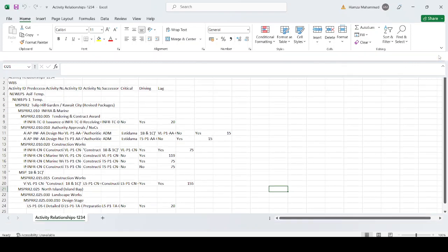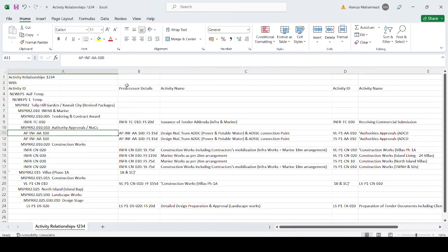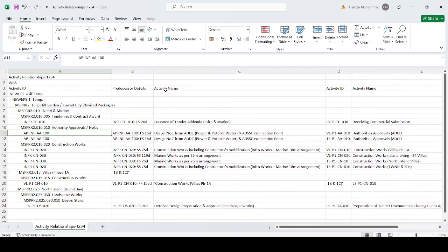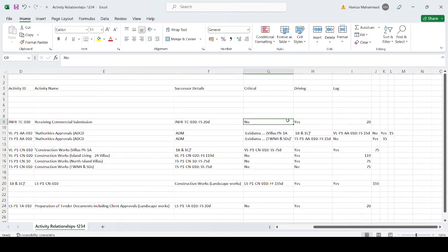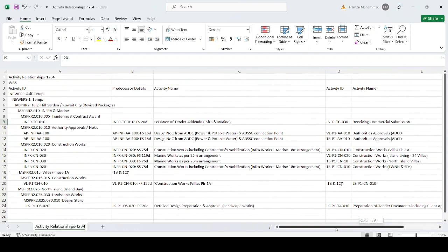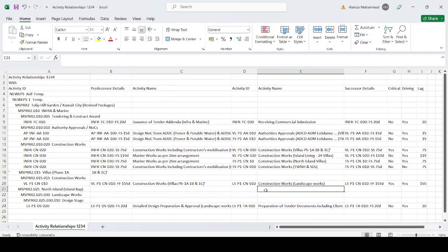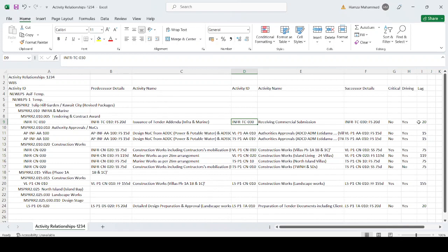The report output is now shown. You can see Predecessor Activity ID, Successor Activity ID, Activity Name, Relationship Details, then whether it is Critical (yes/no), Driving (yes), and the Lag amount — for example 20 days. You can see all activities listed here with their respective lag values, such as 25 days lag and 19 days lag.